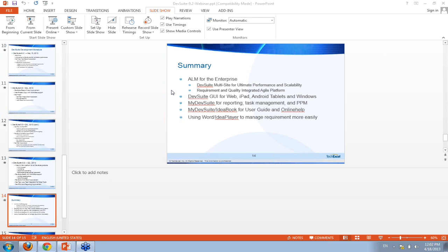Points should not really be estimated by the programmer, meaning you should not say, I have a remaining points of 2. Well, some customers do. But points really represent a number that shows how big this task or this story is, or sometimes it's connected with how much effort a programmer will take. But normally, you're not going to make the points programmer dependent, meaning a junior developer versus a senior developer.